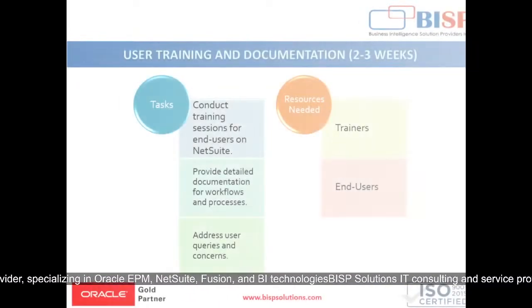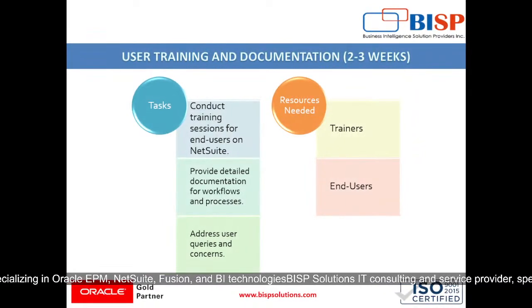Then comes our user training and documentation, which will take around 2 to 3 weeks. The tasks involved in this phase are conducting training sessions for end users on NetSuite, providing detailed documentation for workflows and processes, and addressing user queries and concerns.